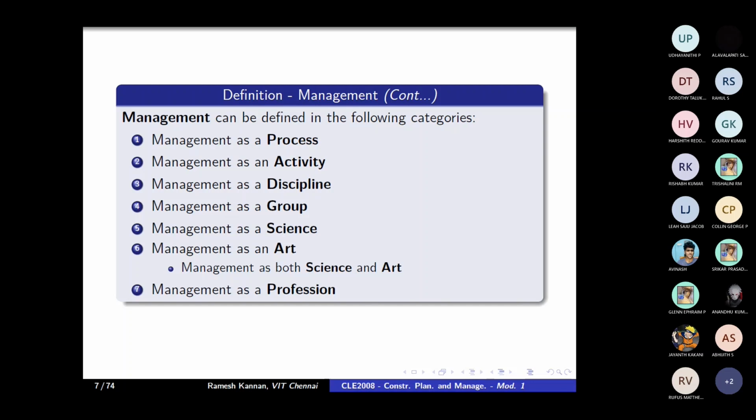Before the tender phase itself, I mean before you quote for that particular contract, in a tender you have to include this as an optional clause. In case there's rain, or in case the water table comes up, in that case we need to do a dewatering process. That's an optional case. If you don't really need to do that, you can avoid it. But if you necessarily have to do that, then you can quote it in your tender itself. It's an optional case, and it's unavoidable.